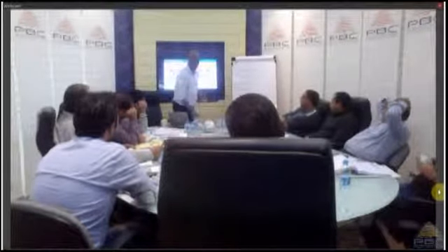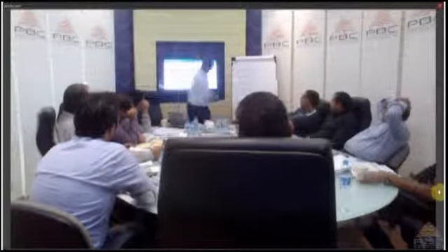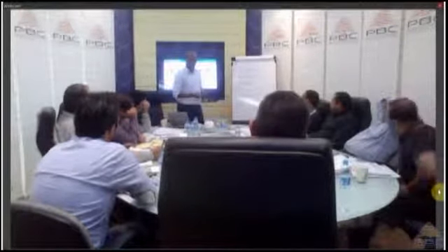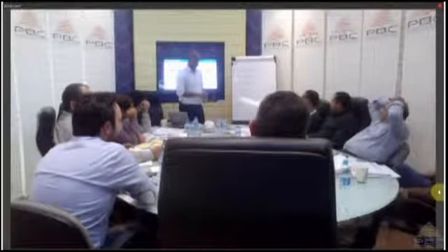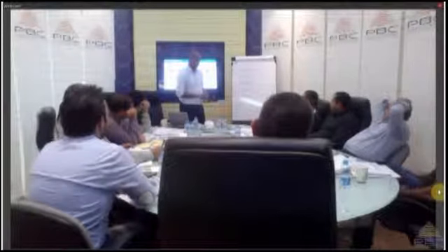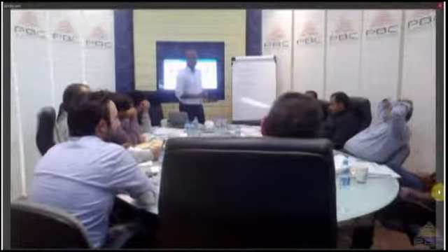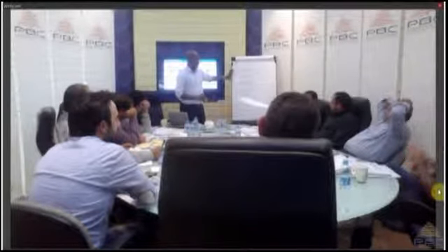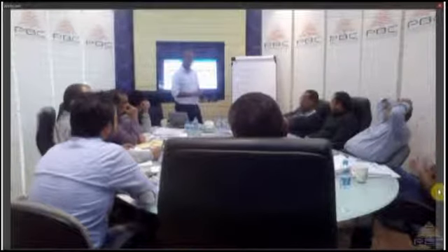Okay? So from your experience, what can you say about this? What's happening here? Yeah, D and E are not correct. Why? Because D has given a very low price, meaning he is unprofessional for the bid, and E has exaggerated the price. The reasonable ones look like A, B, and C, because if you take a 5% fluctuation, it's a reasonable price.